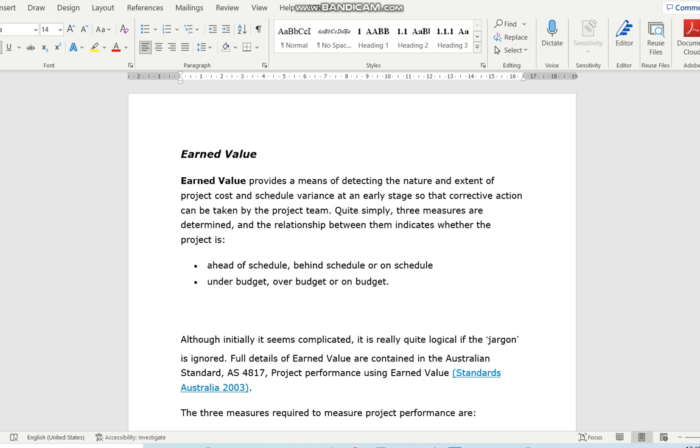So you perform that amount of work. Under that percentage of performance, what is the value of work that is being done? Value of work meaning the cost of the work, okay? Then if you key in the actual cost of the work that's performed, which means the money that you are claiming, then you have the AC value. So there are three values there. With these three values, again, you can calculate your SV and now also your CV, your cost variance.